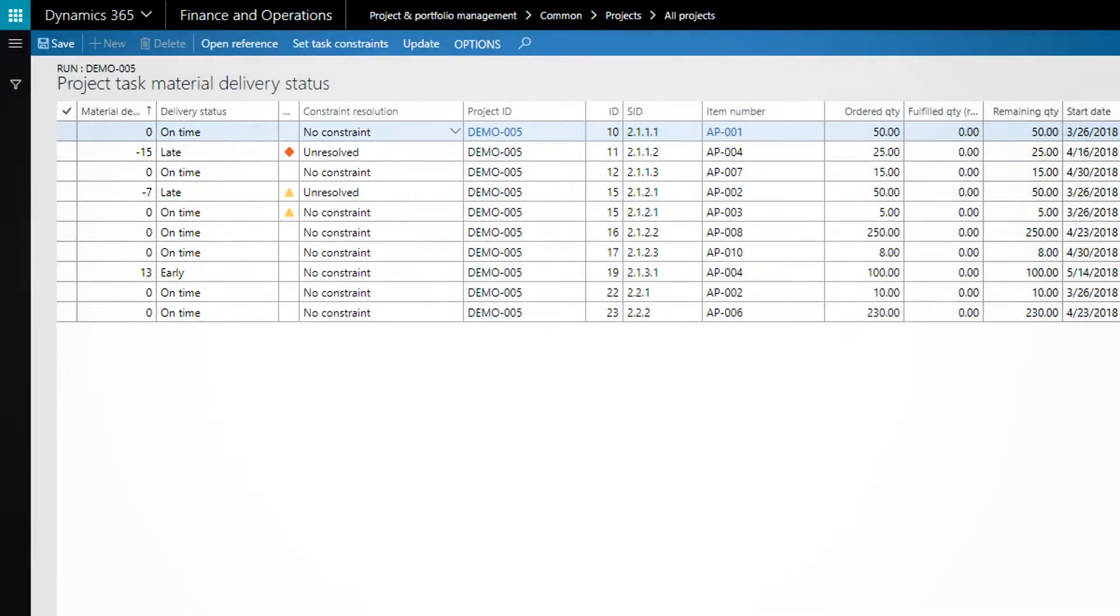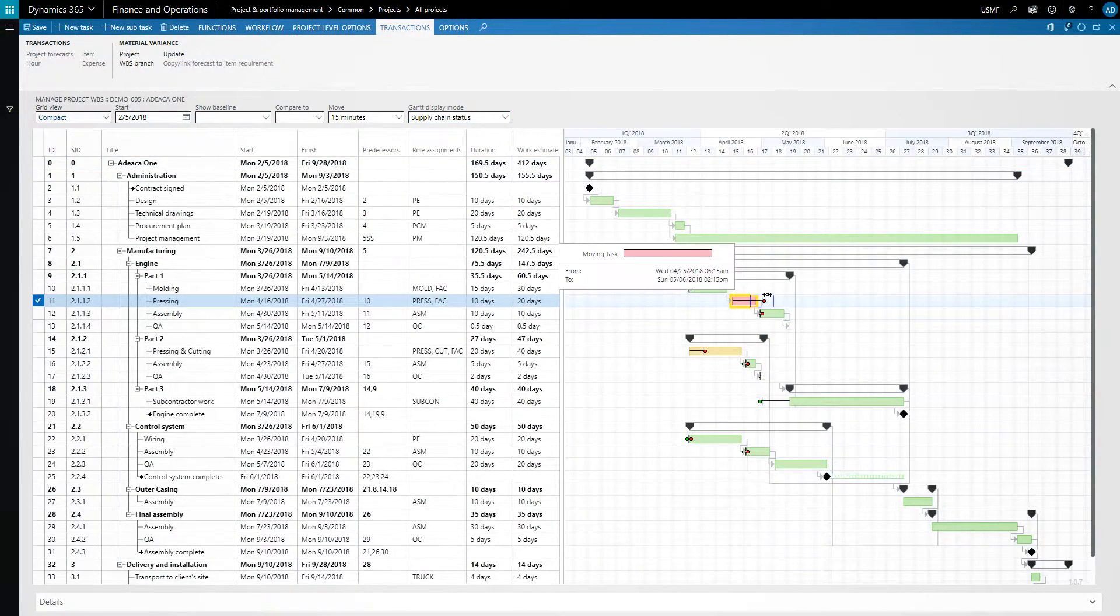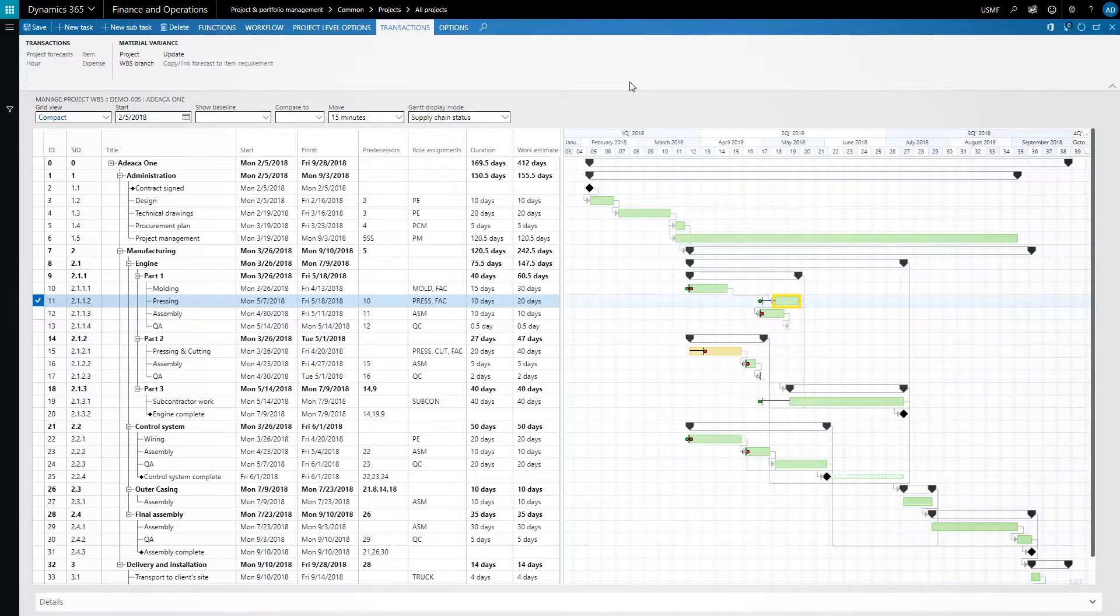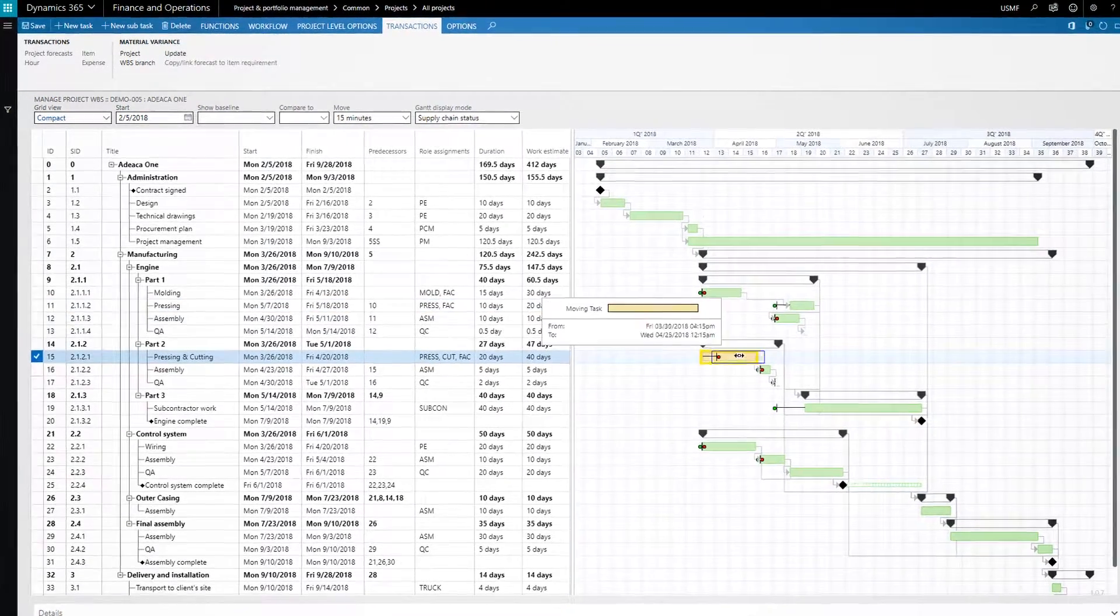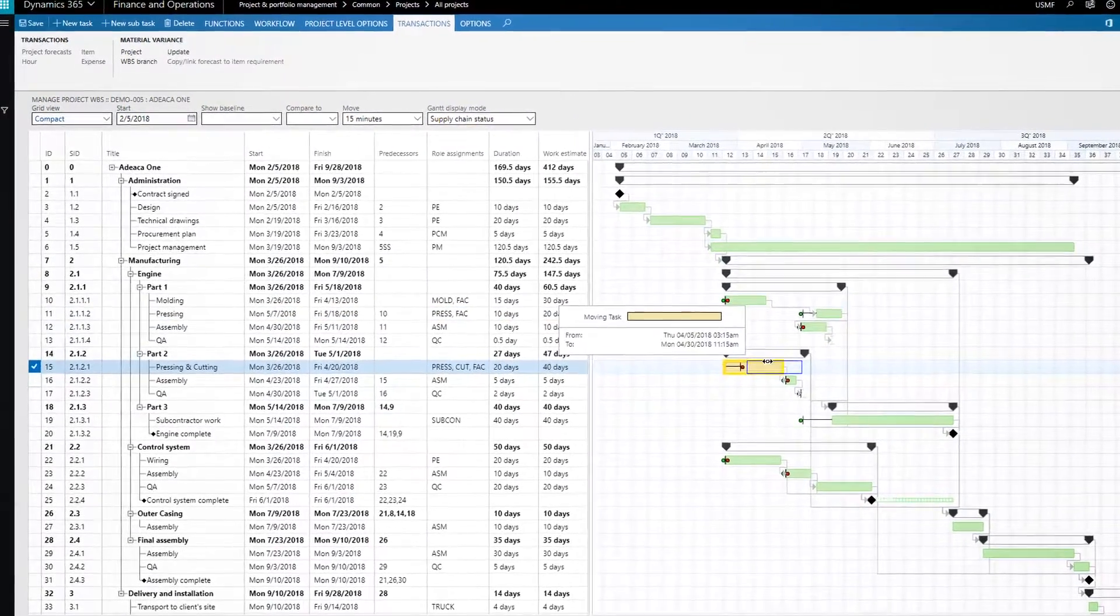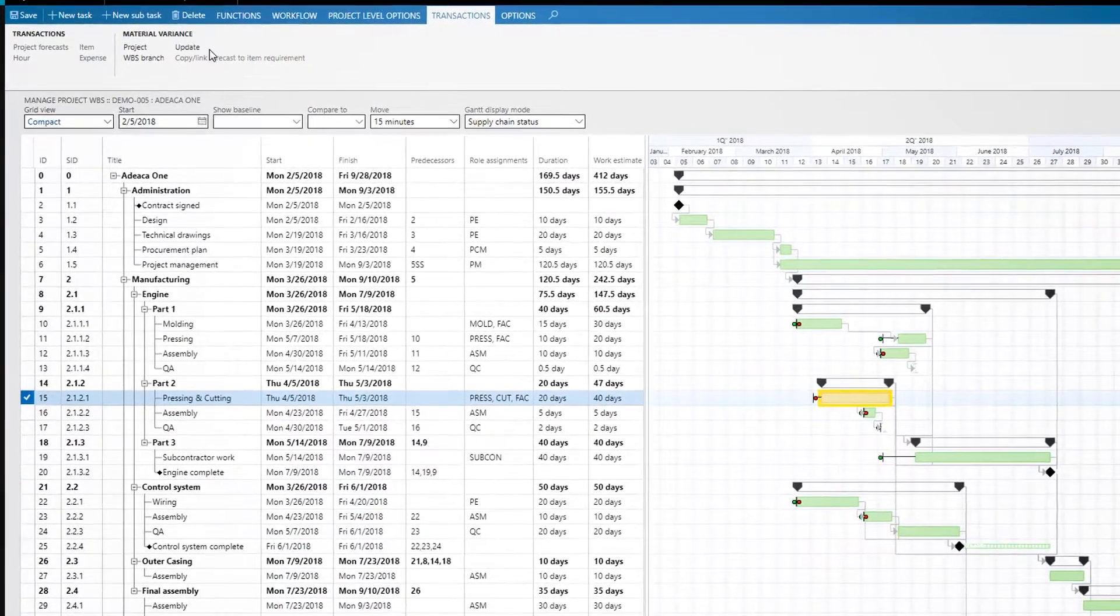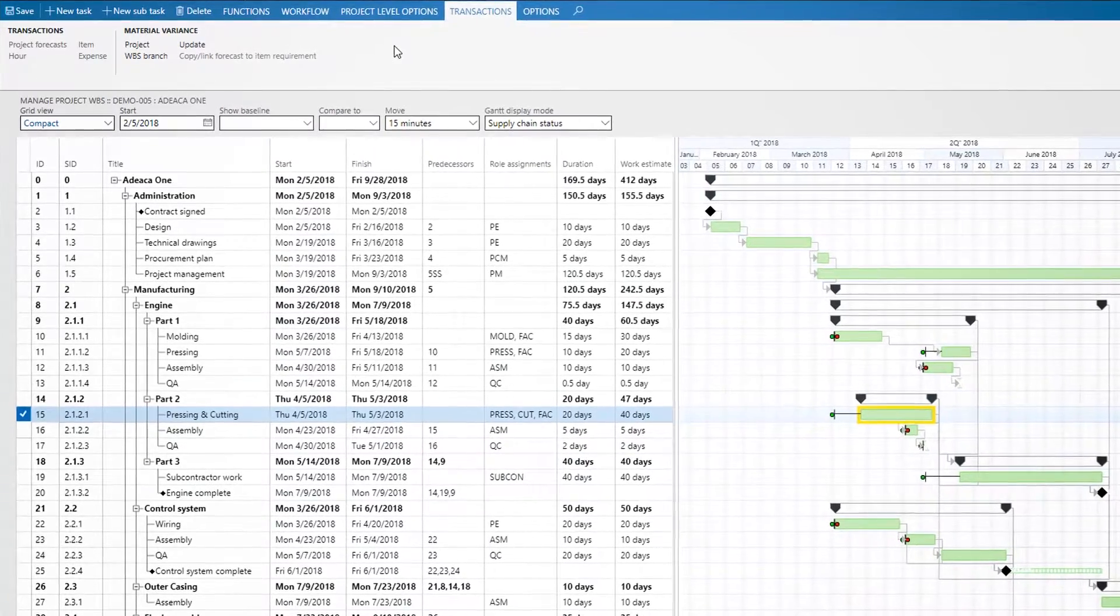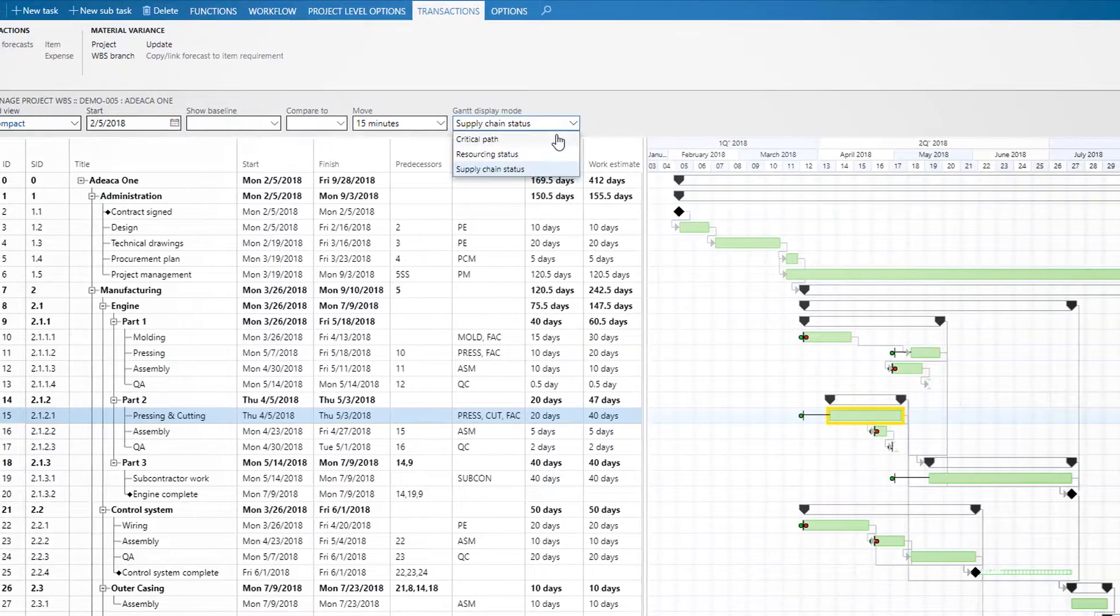Moreover, if delays are encountered in procurement or production, these are automatically applied as material constraints against the schedule. Identifying such deviations early on gives us time to make the necessary adjustments and reduce the disruption to the overall project.